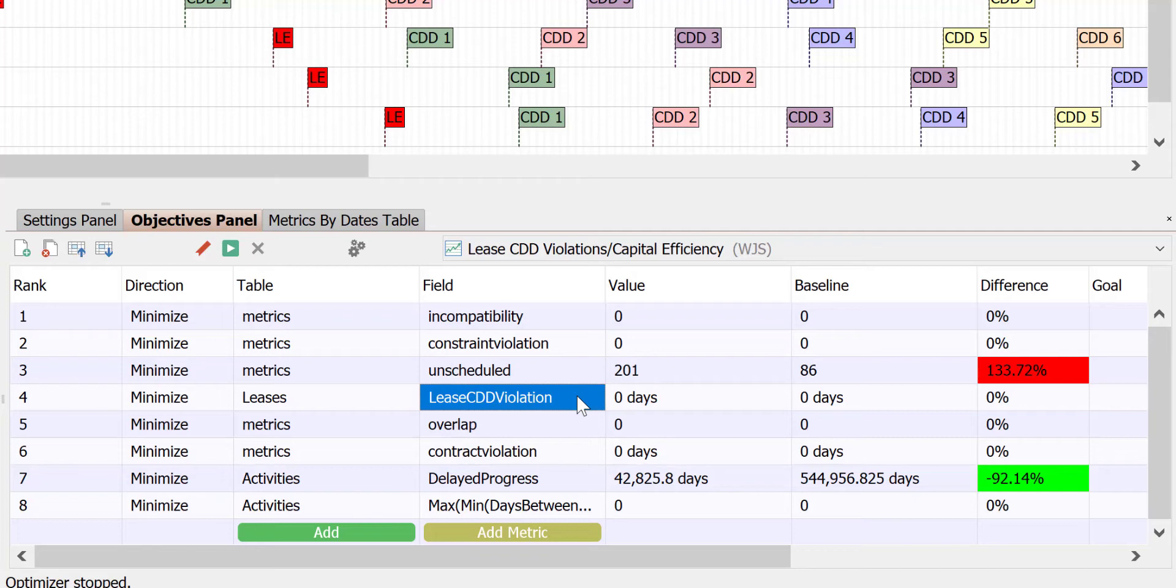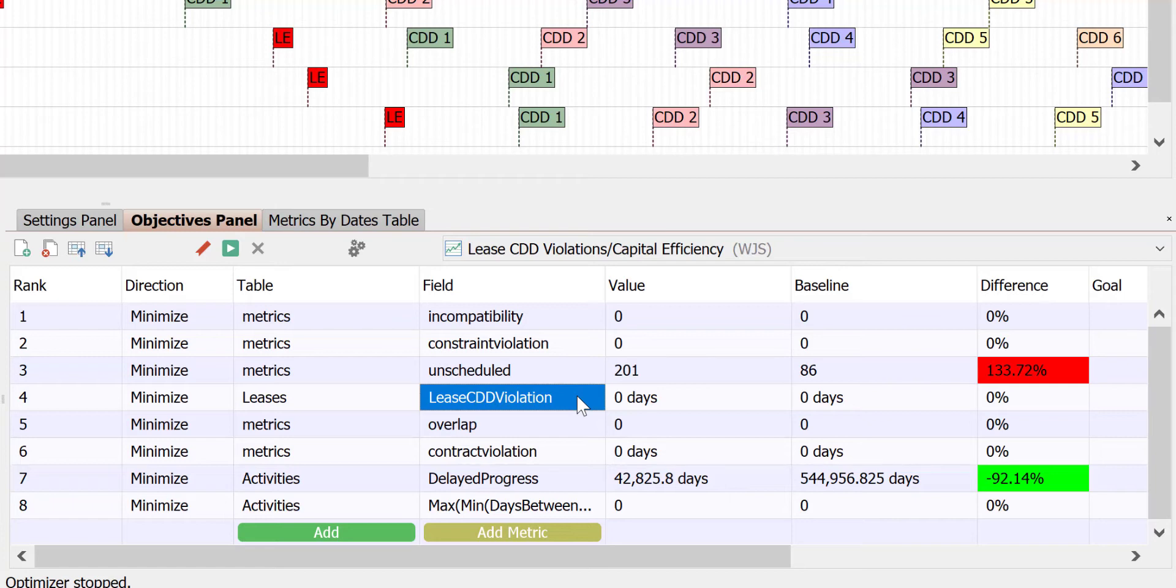The objective ensures that the optimizer will minimize lease CDD violations, and the rest of the objectives are ensuring we have a sound schedule with good capital efficiency. This combination of objectives ensures that we will obey the lease CDD provisions, but also maintain an executable schedule.